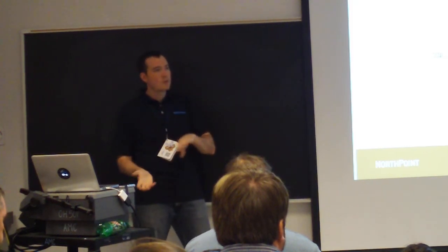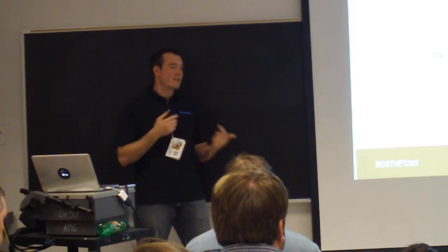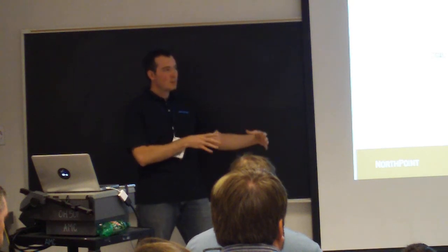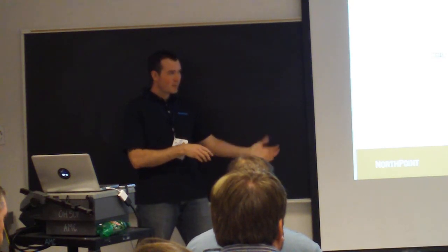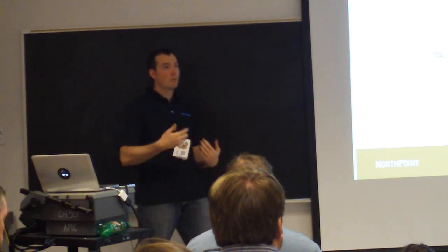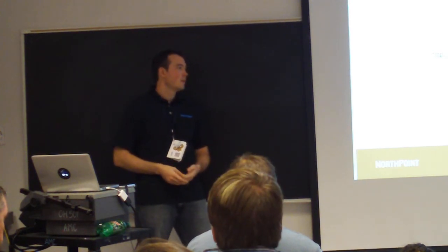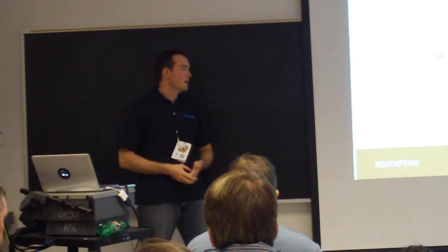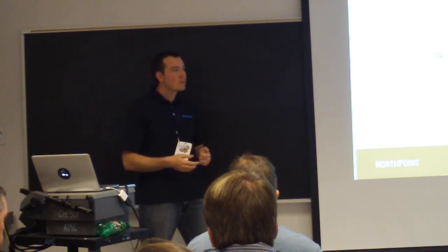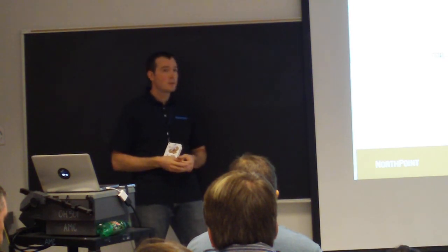The idea is that you push things into the next one, and that's where, as a professional services company, it makes it a little bit more difficult for us to go true agile, because we're dealing with a budget that we're not in control of. We have to hit these dates, so we actually have to get that amount of work done. So we have to adjust scope sometimes as early as possible.